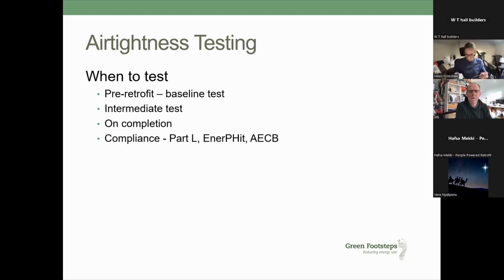Now, depending on what certification you're going through, you might be able to use it for certification. So, for example, with the AECB, it depends on exactly where you do it, but you might be able to use that intermediate test for the certification. For NFIT, you would have to do a compliance test at a later stage. But if the client isn't going for any certification at all, but they've established what they want to achieve, then the intermediate test is the time to do it. It will prove to the client that you've delivered what you said you were going to do. So that's the one to do.